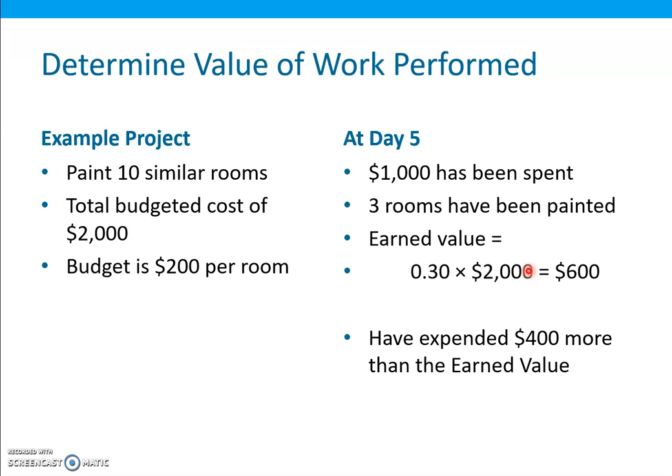Okay, so the earned value, the value of the work actually performed, is a key parameter that must be determined throughout the project. Determining the earned value includes collecting data on the percent complete for each work package, and then converting this percentage to a dollar amount by multiplying the total budgeted cost of the work package by the percent complete. In many cases, the estimate for the percent complete is subjective. It's important that the person estimating the percent complete not only assesses how much work has been performed, but also considers what work remains to be done.